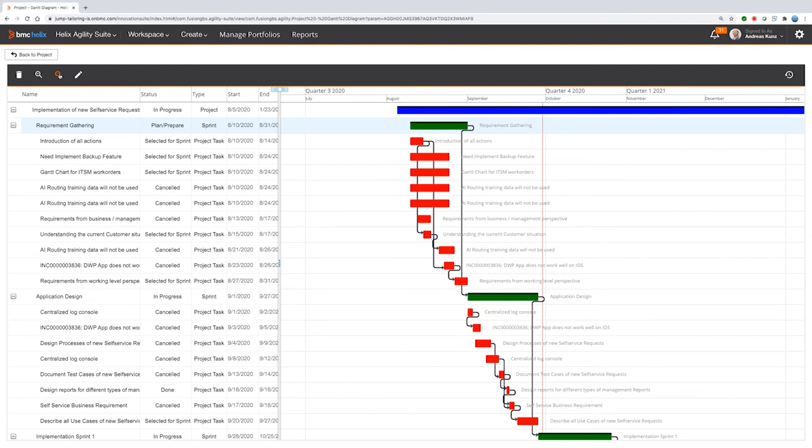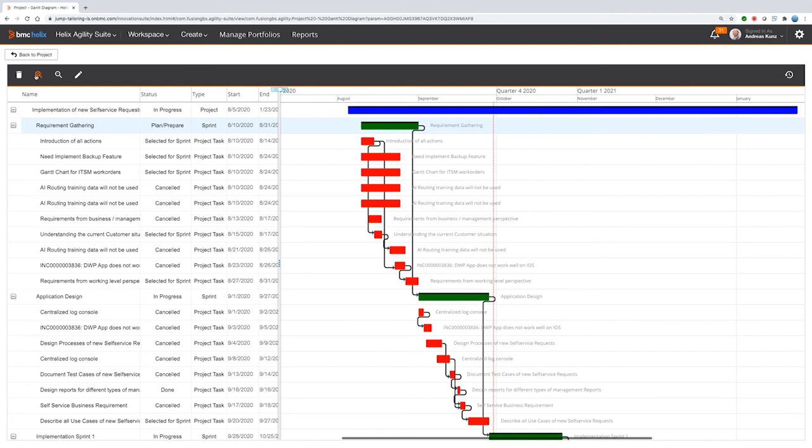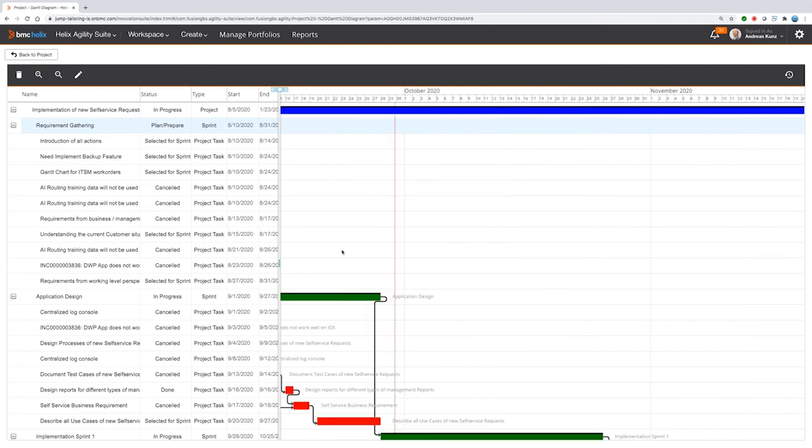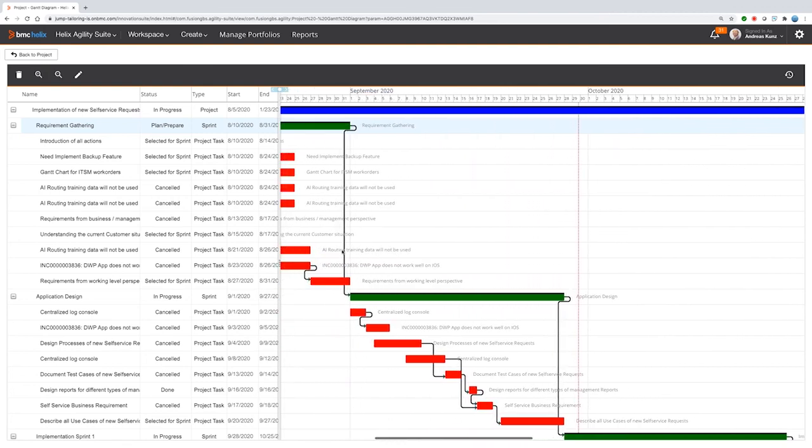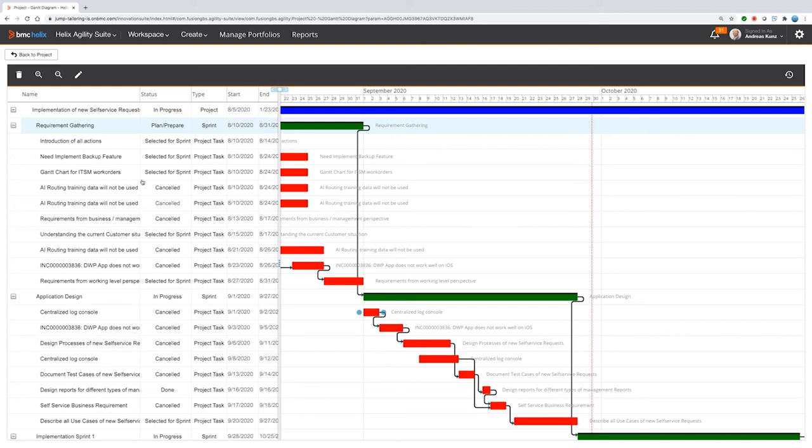You can have a deeper look at one of them. You zoom in, zoom out. You can create also relationships if required. For example, need to create a relationship from that to that task. Then you see also automatic move of all of the following tasks. And that is the management of the tasks in a project.